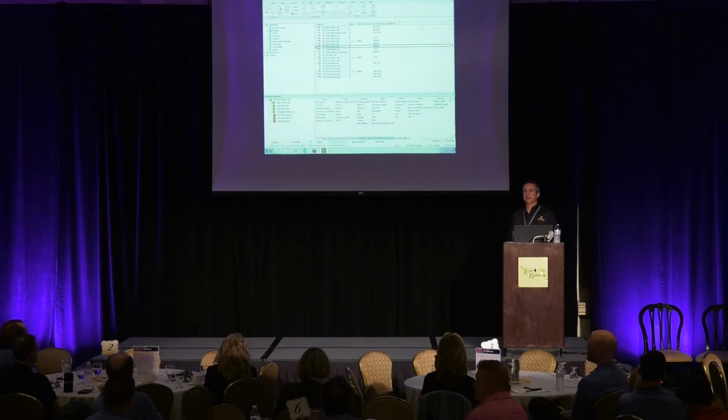Yes. They are locked to that version of that particular transmittal. So even if those drawings update in the future, when you look at the transmittal, you are seeing exactly what went out at that time. Thank you for that question. Good question.